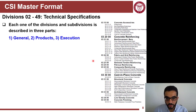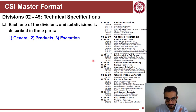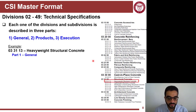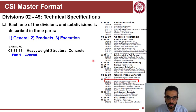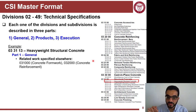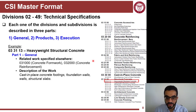Each one of these final subdivisions is detailed in three different parts. The first is the General section of that subdivision. For example, if we're talking about heavyweight structural concrete, Part 1 General will describe the related work items specified elsewhere — outlining the other subdivisions that are related to the one you're addressing.